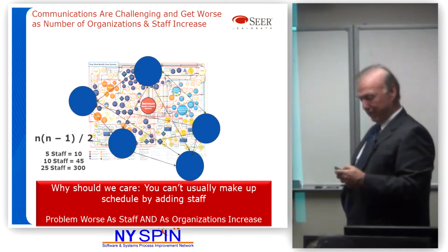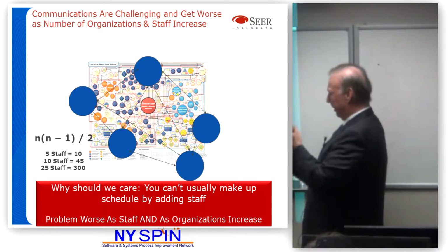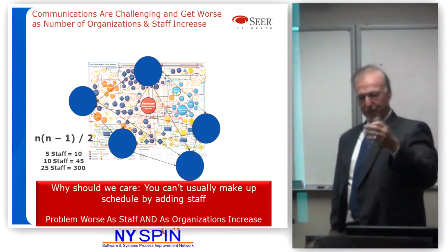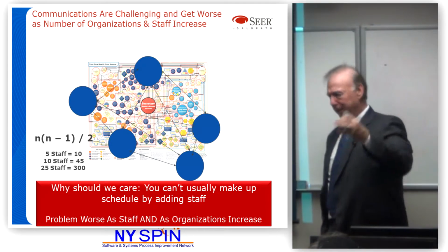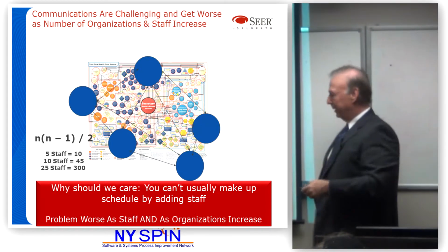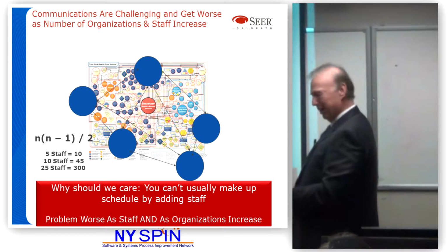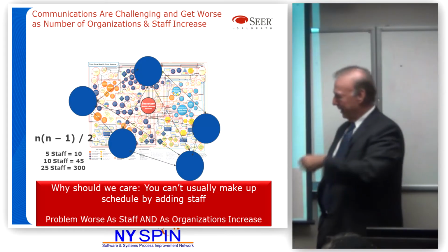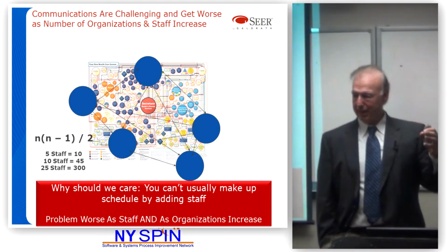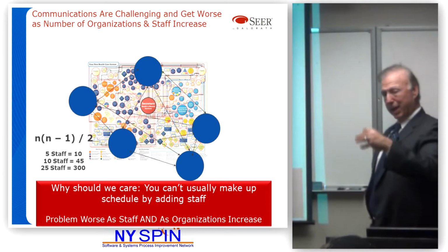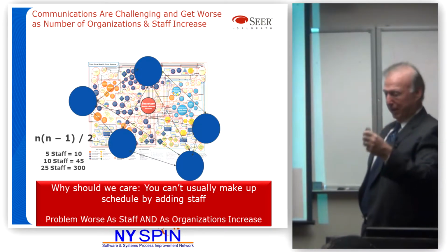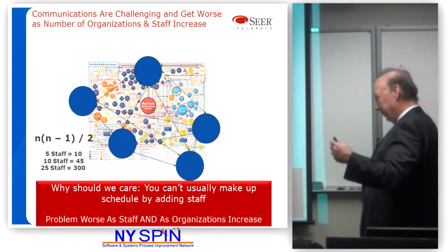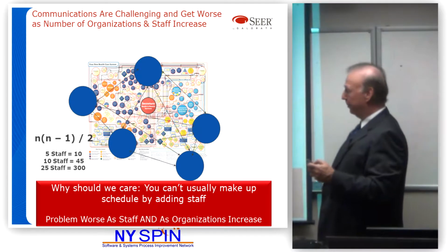Again, part of what happens is you add incremental people to a project. If just you and I are working, we can just talk together, we go to lunch, we solve our problems. We might screw up once in a while, but we can basically get it done. If there's 5 of us, now we've got 10 different interactions. If there's 25 of us, 300 different communication paths. And you can't get 25 of us all to lunch very easily, right? You certainly can't all talk together. And that's okay. It's entropy, lost energy, that's life. Not recognizing that big projects have entropy and are going to be a little bit less productive is another basic cause of project failure.